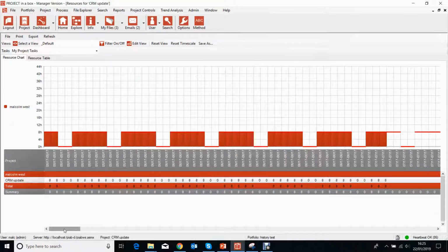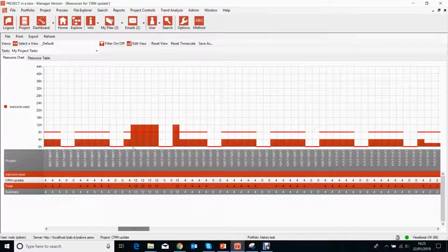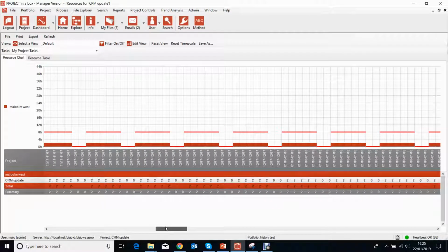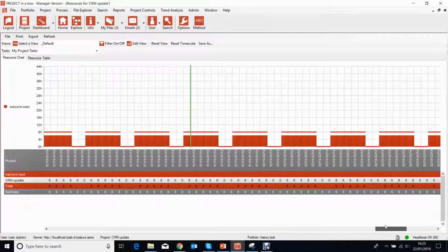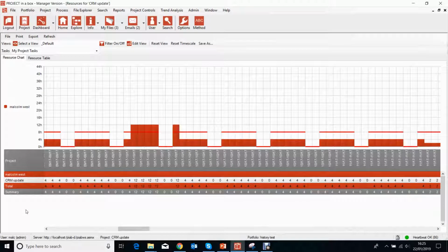Of course, a monthly picture might look fine, but it might be that we've got loads of work in the first 2 weeks and no work in the second 2 weeks, which isn't going to be very feasible in practice. So all of that looked fine earlier, but actually we did have some periods where exactly that situation is happening. Under-resourced on some days, over-resourced on other days. Within the month, that looks fine. And so you often do need to come down to this lowest level to really get a good picture of what's going on, but you might start at the sort of monthly level.